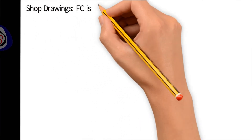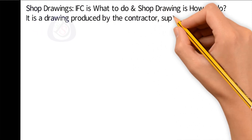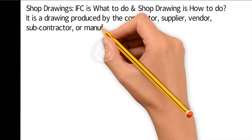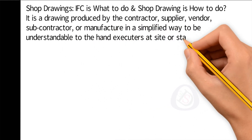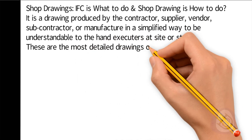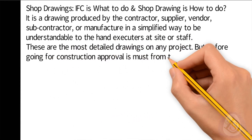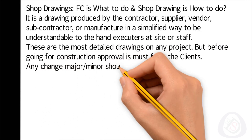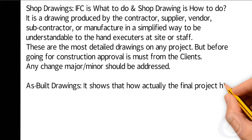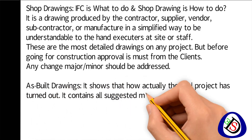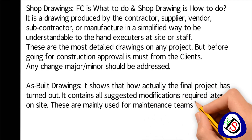Shop drawings: IFC defines what to do, while a shop drawing defines how to do it. It is a drawing produced by the contractor, supplier, vendor, subcontractor, or manufacturer in a simplified way to be understandable to the executor at site. These are the most detailed drawings on any project, but before going for construction, approval is a must from the client — any change, major or minor, must be addressed. As-built drawings show how the final project has actually turned out and contain all modifications made on site; they are mainly used by the maintenance team.